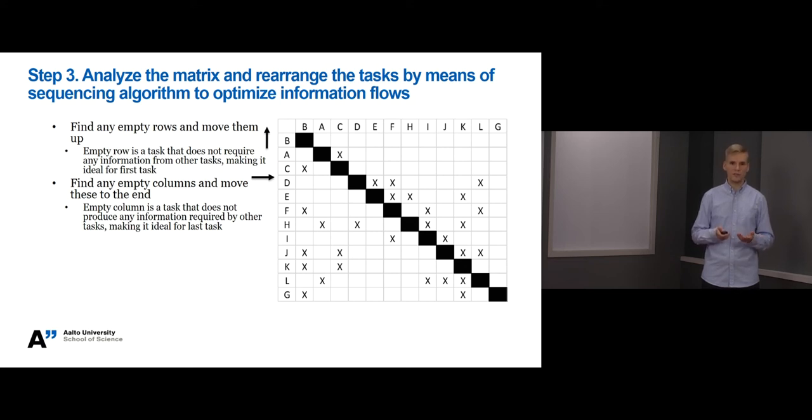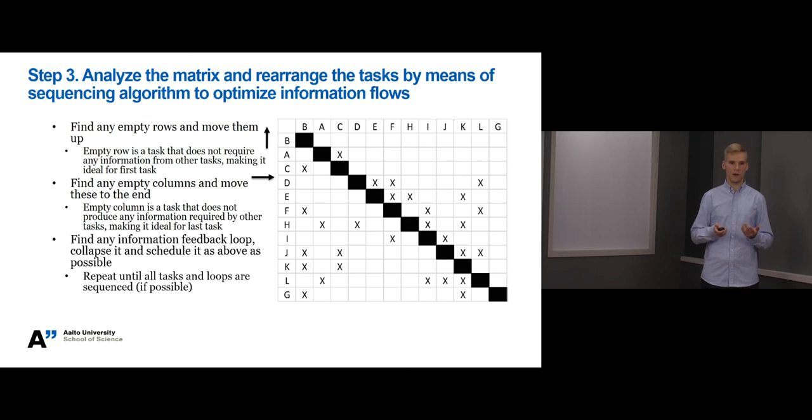The logic is that inputs are easier to capture than outputs. When we achieve a situation where the cross marks are below the diagonal, it means that all the tasks are sequenced. And as you remember from slide 4, sequenced tasks need only information from the previous tasks, having no feedback loops from successors, making the project more straightforward to execute. So how do we achieve this? Well first we try to identify any information feedback loops between tasks. Then we move the tasks that cause information feedback loops as upfront as possible in the matrix to eliminate or minimize information feedback loops. We repeat this until all tasks and loops are sequenced if possible. So in practice this is a kind of an iteration exercise.